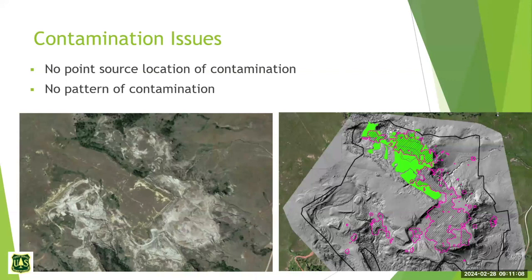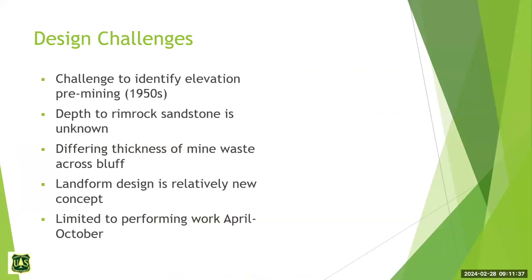For contractor direction, our plan is to take all of the mining overburden off the side — even if it's not over our cleanup goals — and put it back on top of the bluff, encapsulating it. The higher concentrations go deeper into the landforms so they are buried deeper and isolated from human health and the environment.